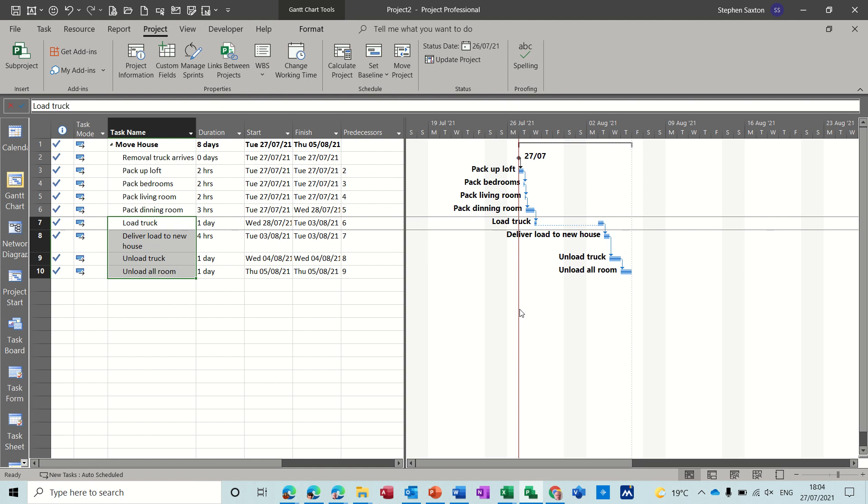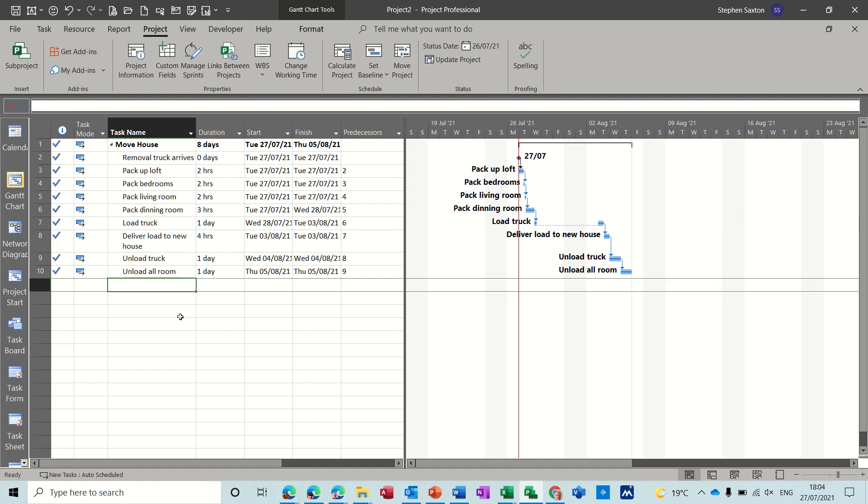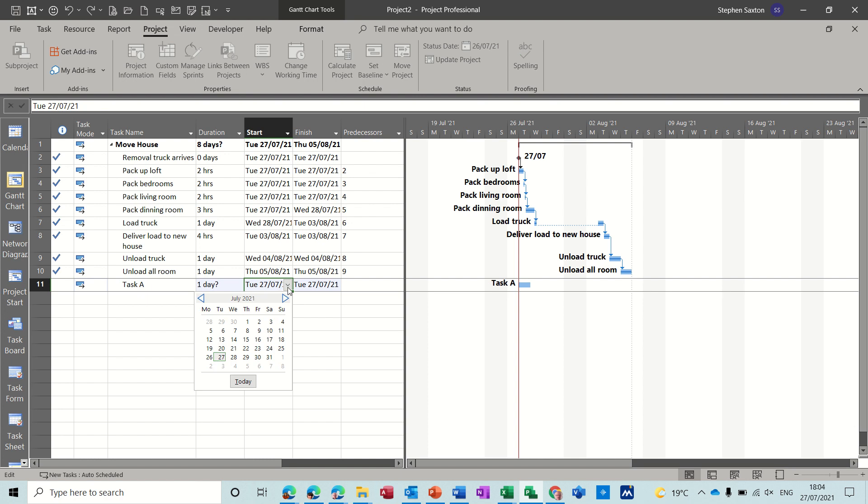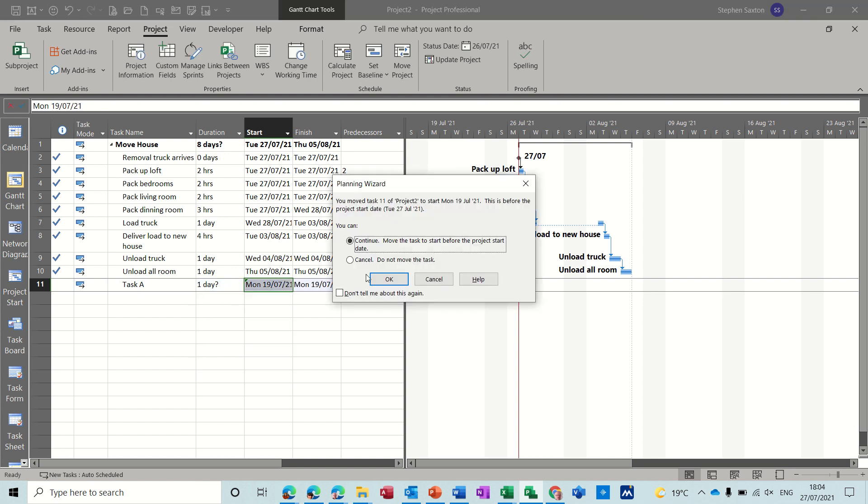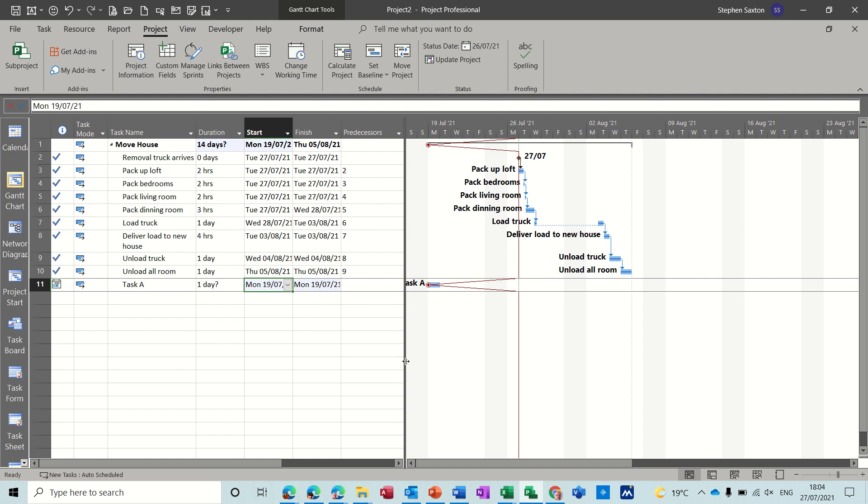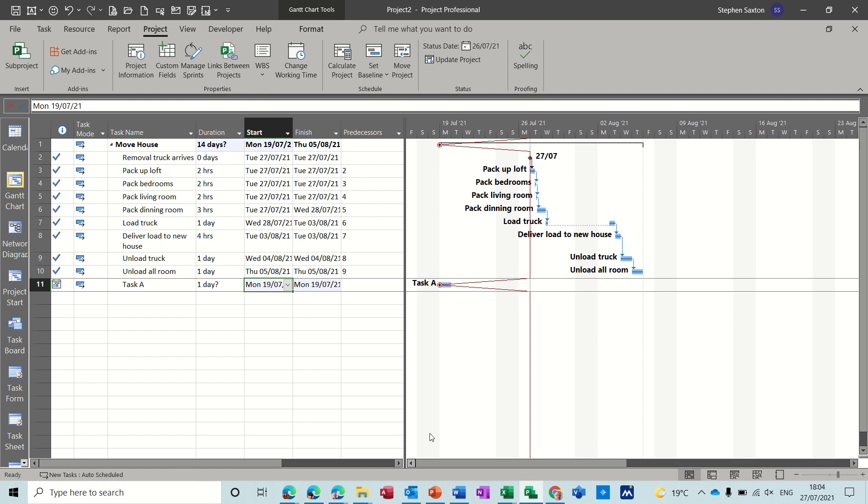If it's spiking back it's showing you where you've got delays because of a particular task. So task A I put there and let's just say that was due to start before the project started on the 19th. Yeah so you can see it's spiking back to that because according to that it's delayed, didn't happen for some reason and that's what this will show. So it can look quite ugly.